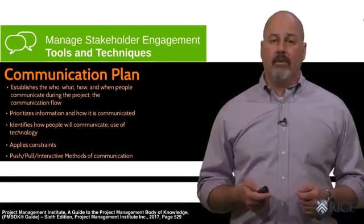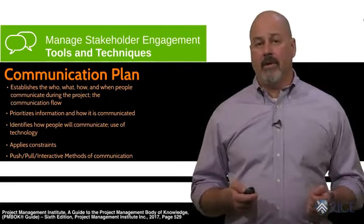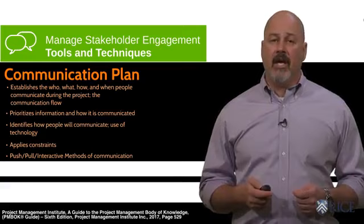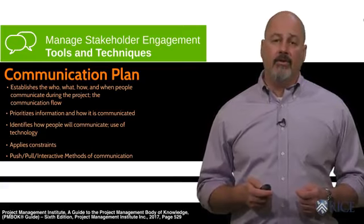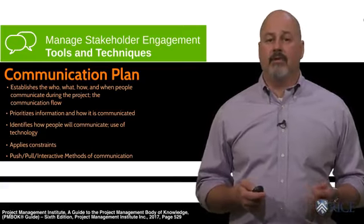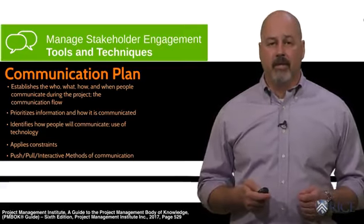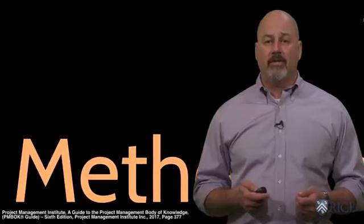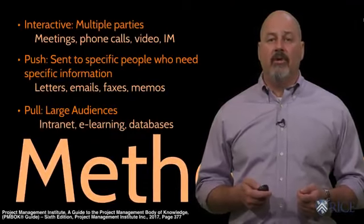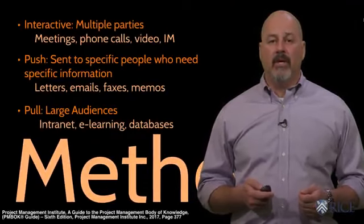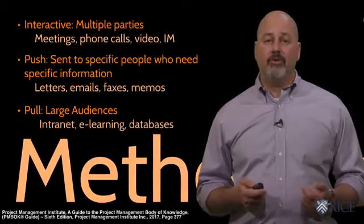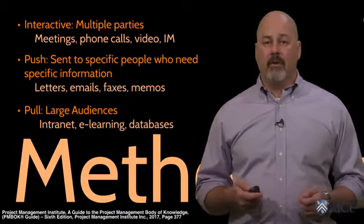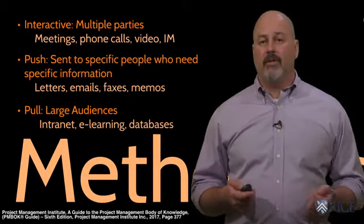For some people it's a phone call, for others it's email or Skype. Lastly, it should indicate whether you use a push or a pull method for each person. Keep in mind this is an interactive part of the project management plan and you should identify the types of push or pull communications that are determined most appropriate for each situation or person.